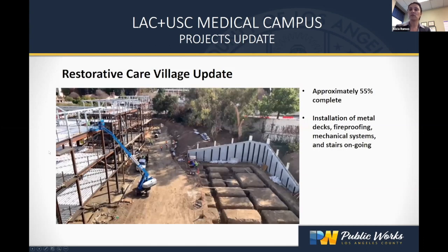Okay, so an update on Restorative Care Village. As I said, you have a lot of steel on site right now. They're doing fireproofing. We've got metal decks going in. We've got the mechanical systems going in and the stair construction. We are approximately 55% complete with this project.